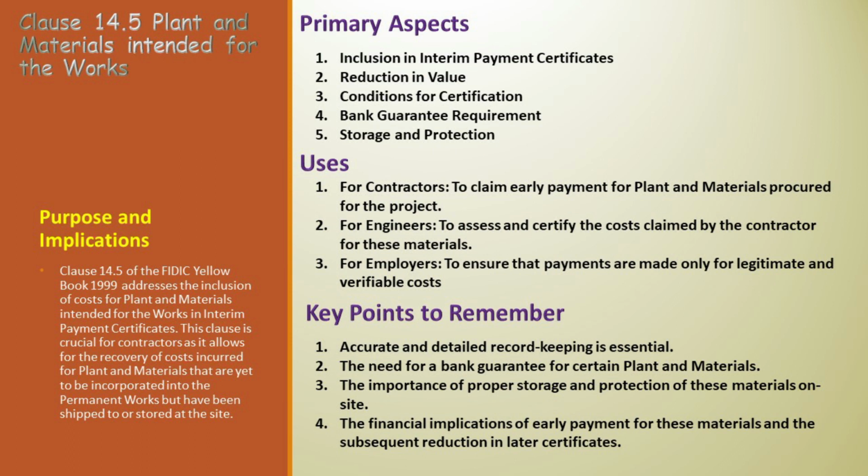For engineers, the clause plays a crucial role in assessing and certifying the costs claimed by the contractor. This responsibility demands thorough scrutiny of the provided records and ensuring that the claimed costs align with the actual expenses incurred for the plant and materials.